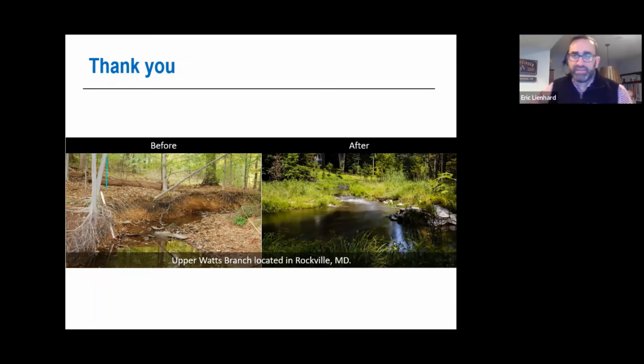So the 235 is what we placed in the design. We're still waiting, and there are additional trees in the design. So we have some work up on Albemarle. There are 3 or 4 trees up there at the trailhead that are dying, dead and invasive that we've been asked to remove as part of the work, as we're adding a triple catch basin up there to help with some of that stormwater coming off of 32nd Street and down to Albemarle. So we've got a couple trees that the Park Service and DDOT, because of their invasiveness, have asked us to remove.